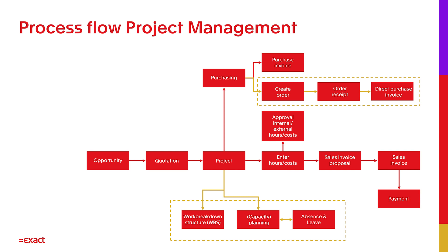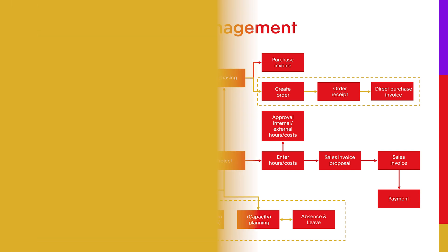The purchase orders that need to be charged and the hours that are registered will lead to an invoice proposal when your project is based on time and material. When the project is based on fixed price, the invoice proposal will show the invoice terms. This all is linked to the financial administration, so no extra work is needed to process this.